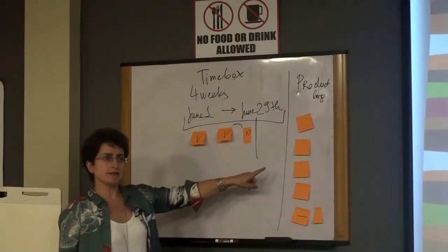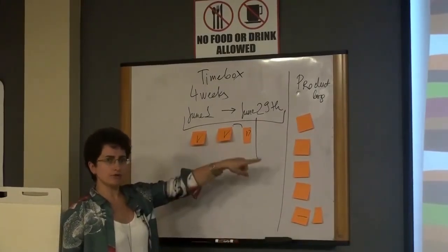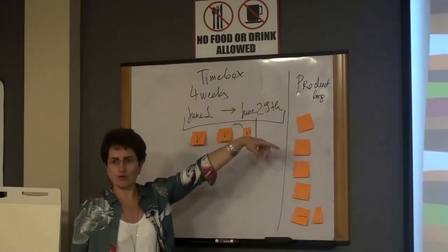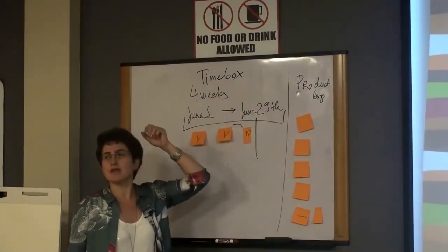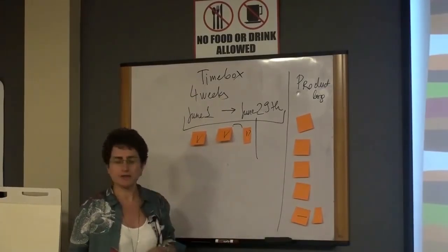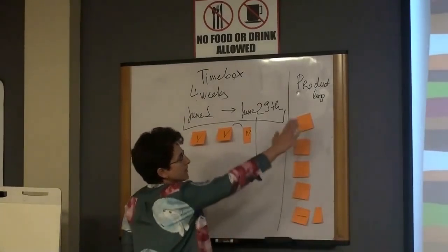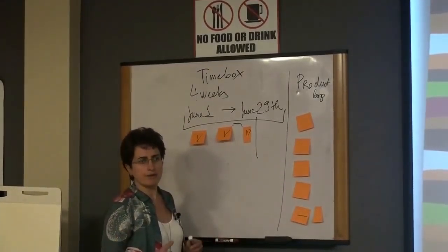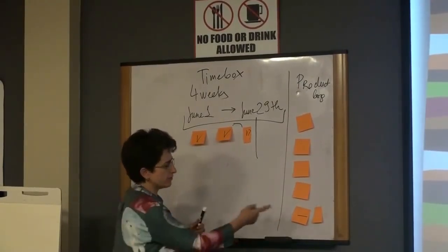What happens then? The product owner, who knows the market, would need to reprioritize all the features all over again, because this exercise is done in the beginning of each and every iteration, in the beginning of each and every sprint. It may happen that by this time, these features used to matter a lot. It was the priority one, highest priority features.